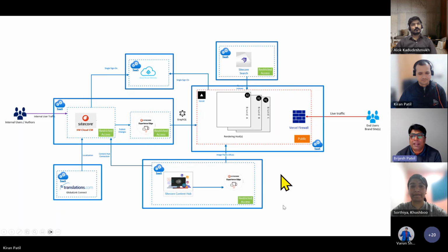Now, when we talk about a typical XP project, the phases that project undergoes are UX, UI, design, development, QA, and then, at last, the content authoring comes in place. My experience and my recommendation here is, if you are talking about the whole end-to-end delivery of a project, consider taking content at the first place. Don't plan content at the last, because that would be the only last step blocking you from launching a project, go live, right? If your home pages are not ready, if your website is not ready with the content, with the actual assets, videos, you are not able to make your project live.